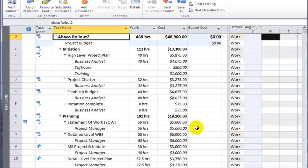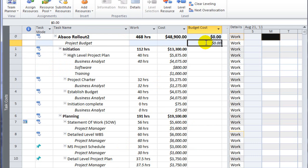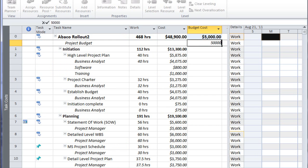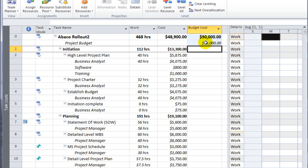So I've closed my assign resource dialog box and I've got a special field called the budget cost, and the budget cost is where I can put in my total budget for the entire project. So if my total budget for the entire project is $50,000, I'll go ahead and enter that into the project budget assignment.